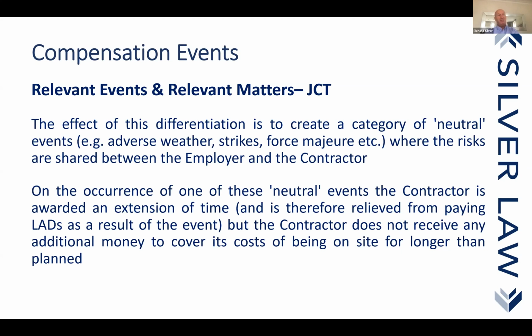It is my experience that contractors all too often price the loss and expense separately, rather than much better and easily to do in the variations. Because if you're pricing the loss and expense as part of the variations, you're dealing with cause and effect. That's the way you should be doing it.